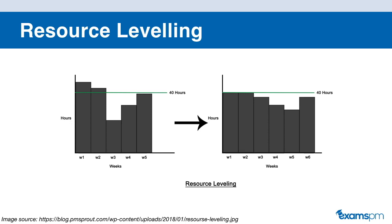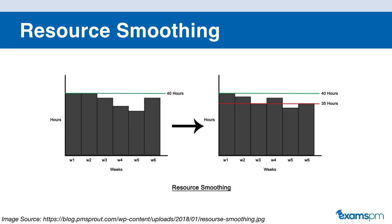The second resource optimization technique is called resource smoothing. You use resource smoothing when you have to optimize the resources and you cannot extend the schedule. As we can see from this diagram on the left-hand side, in weeks one and two you're using the resource at full capacity of 40 hours, while in weeks four and five you're using it a lot less. So what you're doing in resource smoothing is readjusting the schedule a little bit so that the resource has an even amount of work throughout the six weeks.